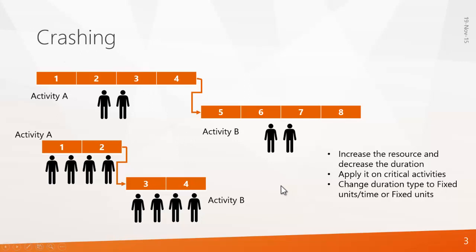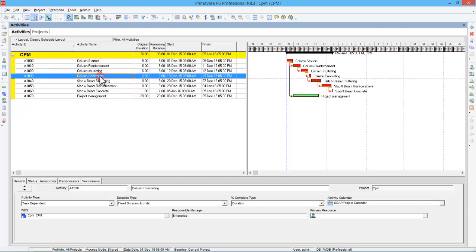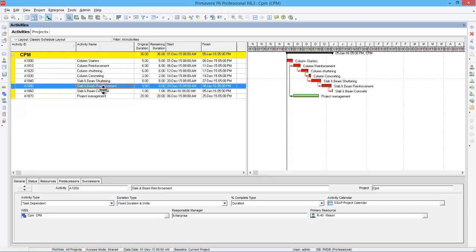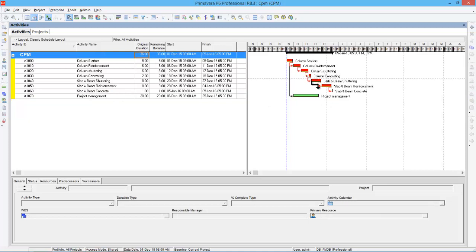Now we will see how to apply these techniques in Primavera. Let's open the software. In this example there are activities: column starters, reinforcement, shuttering, concreting, slab and beam shuttering, reinforcement, concrete, and project management. The total project duration is 36 days with both critical and non-critical activities. In a real project with 3,000 to 20,000 activities, there will be many critical and non-critical activities. To reduce from 36 days to 30 or 26 days, you can apply fast tracking or crashing.